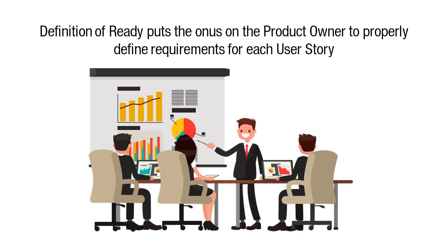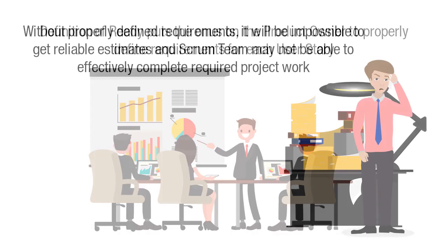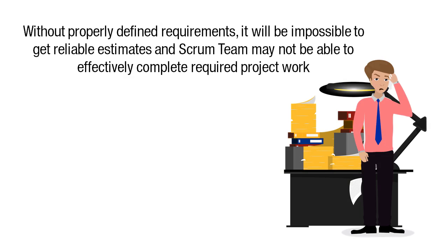The definition of ready puts the onus on the product owner to properly define requirements for each user story. Without properly defined requirements, it will be impossible to get reliable estimates, and the Scrum team may not be able to effectively complete the required project work.